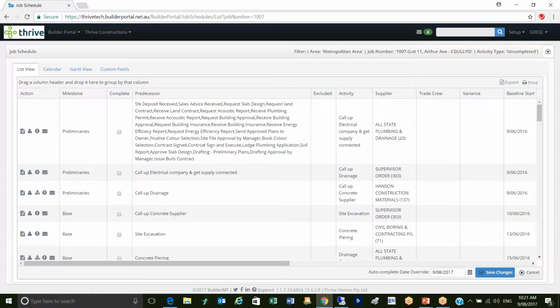There are a few different ways to do VPOs. You can set limits on the amount of money that a supervisor can spend on a job. It might be an over limit of $300 or $500, and then what the system will do is automatically send that back to a construction manager or someone who has the authority to approve the order. So there's various ways you can do it, and that can be multiple levels also if you want to do it.